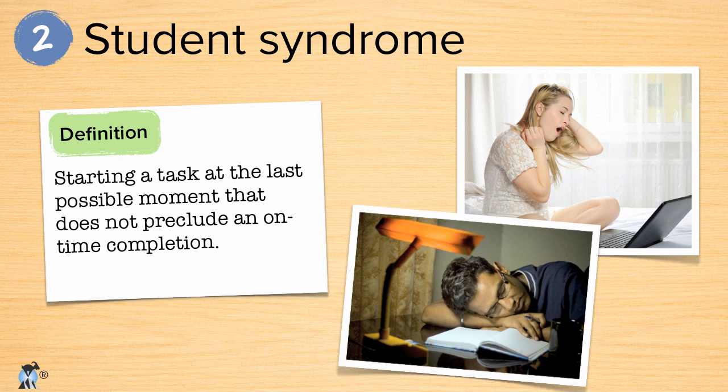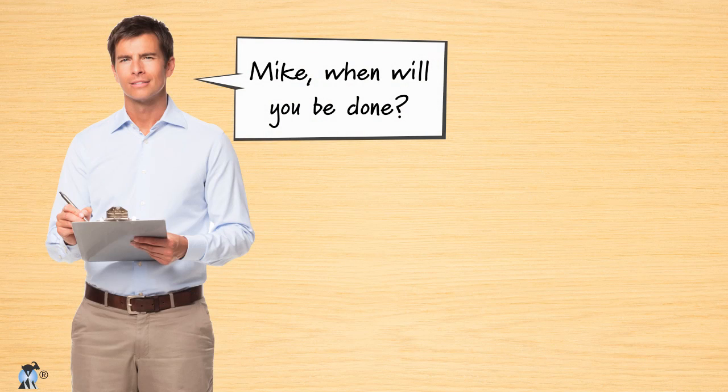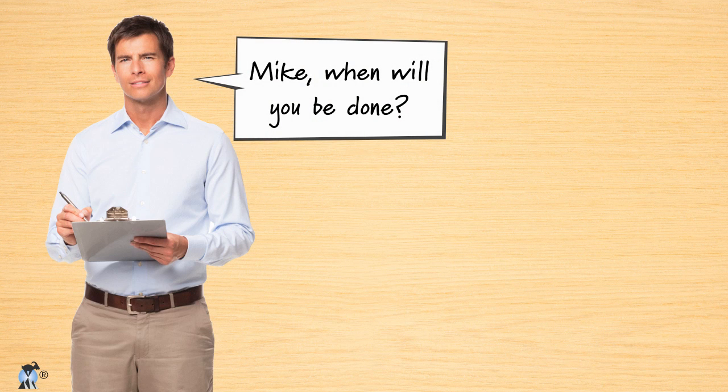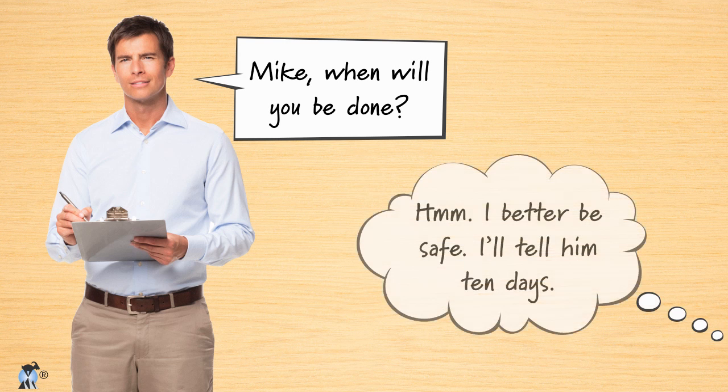Student syndrome affects traditional projects because we often feel optimistic about estimates we gave earlier. Suppose my project manager asks me how long something will take. I think about it and decide I'm likely to finish in seven days, but I don't want to risk being late so I tell my manager 10 days.